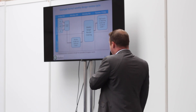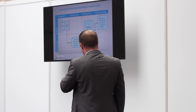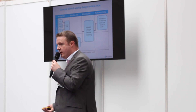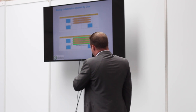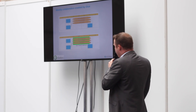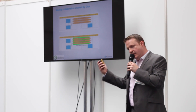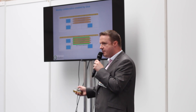Here's the weekly design review cycle. The main discipline teams create a merge model, review it on Monday morning, set up a weekly design review meeting Monday afternoon, and spend the rest of the week fixing all the issues found that morning. With Glue, rather than waiting for defined points in time to get information back and forward, as each discipline member updates the base model, the federated and coordinated model is updated in real time as well — so each member can update and clash multiple times throughout the week.